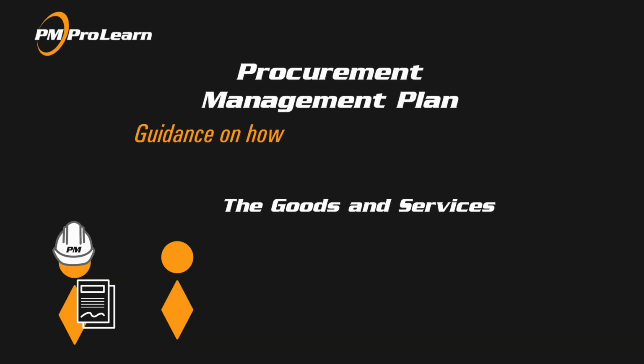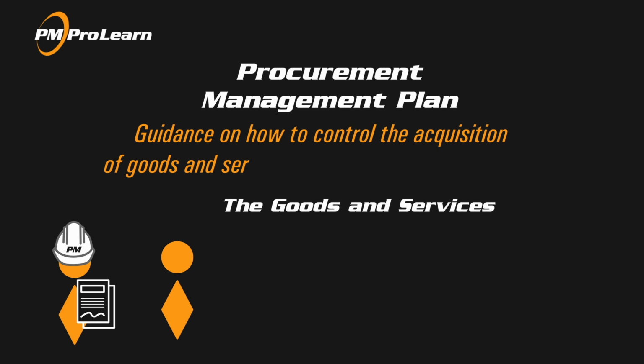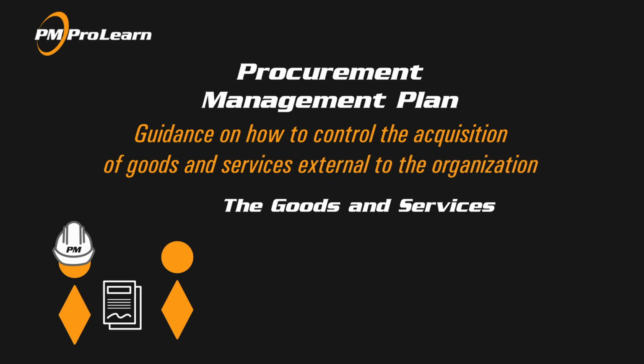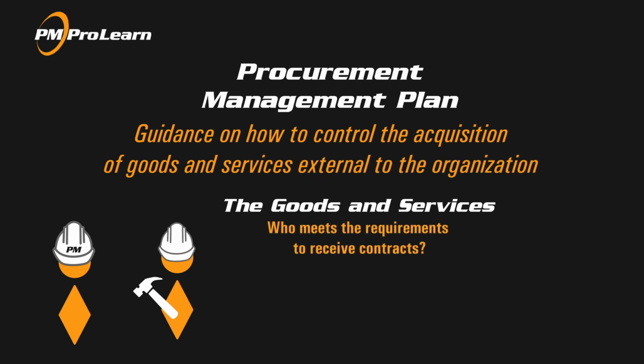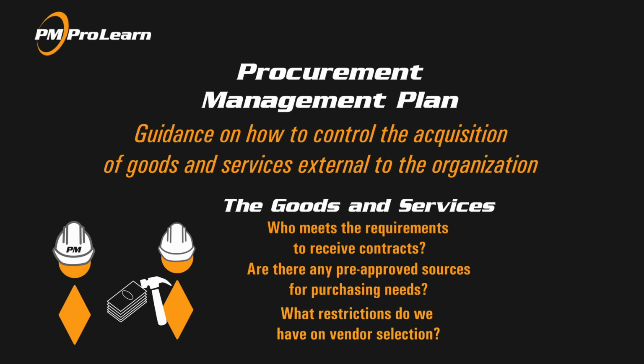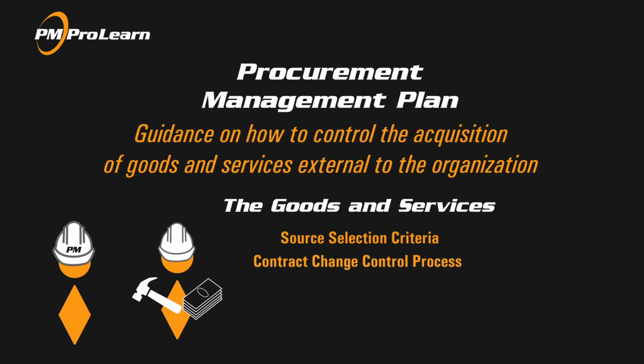In addition to resource management and cost management, we may also consider procurement management. Although we know our budget, do we know the proper ways on how to utilize the budget? By whom are we purchasing from? What makes one vendor more preferable over another? This procurement management plan outlines how goods and services will be appropriately acquired from external suppliers. For example, vendor selection criteria, contract control processes, and approving authorities for purchasing could all be included in the procurement management plan to ensure timely delivery of external resources.